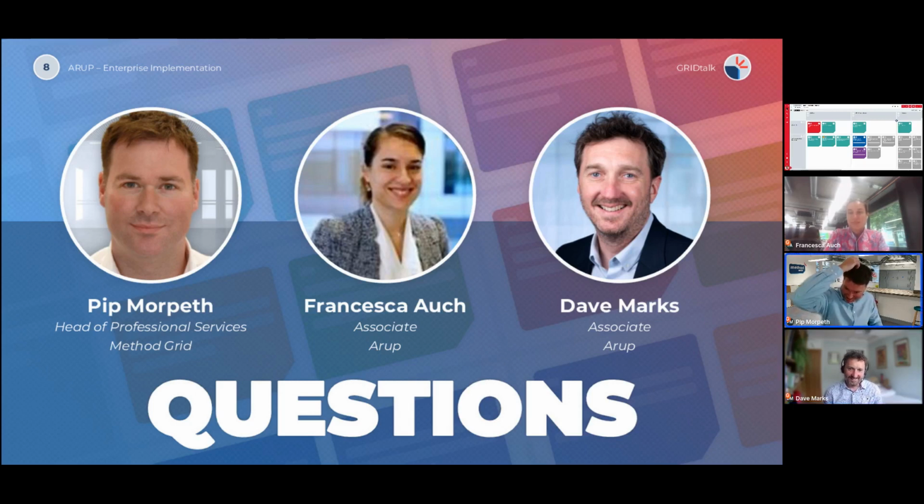Francesca, one thing? I think I would have started broader stakeholder engagement earlier. There have been a lot of great contributions, but we did have to get something together. So we focused on the SME leads, had lead authors, and had a team trying to put together a product. We're now moving into broader stakeholder engagement, and we're seeing the value of that now. I wouldn't say it's a regret, but potentially there was an opportunity to integrate that value a little earlier, so that the toolkit we are using today already has it embedded as part of the quality content that we're providing.